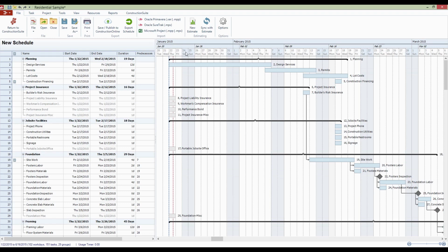So as you're looking through this and calculating out durations and everything like that, keep in mind that sometimes the tasks are going to be ignoring certain dates because you either have them set up as weekends or holidays or something like that. And it's represented here on the Gantt chart just by having these shaded out bars.